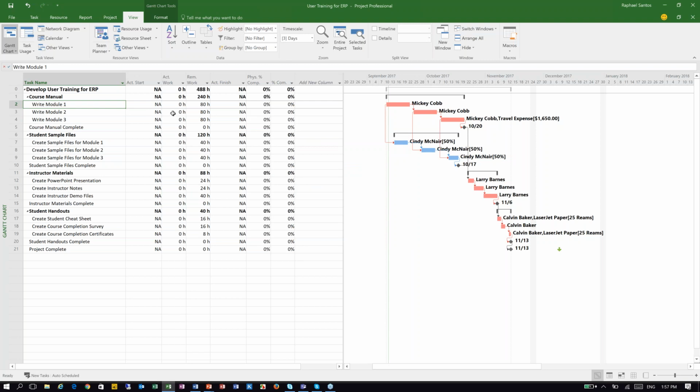And then let's say that I'm going to ask the same questions to Mickey. But here, instead of asking her what's the percent of completion, I will be asking how much work she has performed on this task. So the first question is, where did you start this task? And then let's say that she says, I started this task on September the 11th. So it's going to be the same. But here, instead of asking the percent of completion, I will ask how many hours of work have you dedicated for this task? And then she can say something like, I have spent 24 hours, for example.